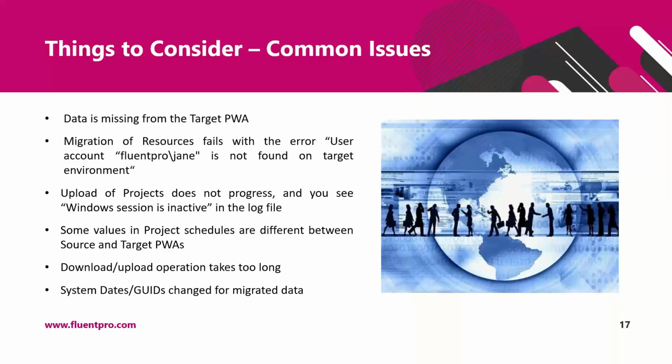So migration is usually not something that can be done overnight, and during test migration, you will find out how long it takes to perform the migration for your specific data in your specific environment. Before you get this empirical knowledge, you can only operate with some general knowledge of the average speed of such operations, like when you create a draft project plan.